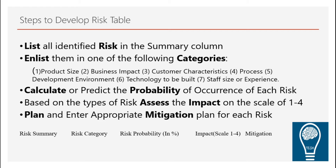The remaining categories include: process risk, which involves the development processes followed in the company; development environment, covering things like remote work and communication channels; technology to be built, including all technological upgrades and updates that affect the system; and staff size and experience — or inexperience — which also plays a part. You list summarized risks into these categories.